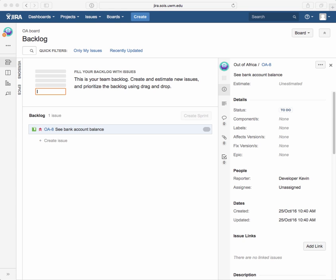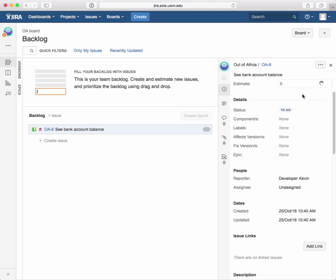We typically try to keep the team in the lower part of that when they are estimating individual user stories. I'm going to say, because this one is a typical user story, I'm going to say that our team played estimation poker and we thought that it was an eight. So I'm just going to click on that estimate field and put an eight there. And again, when I click off of that, it's been updated. There's no submit button.